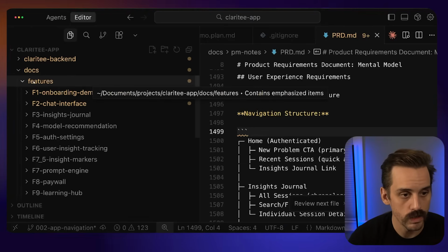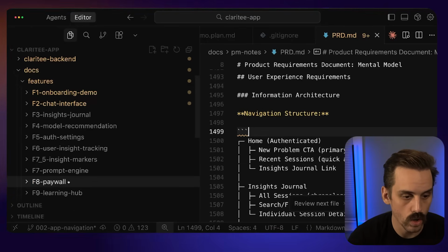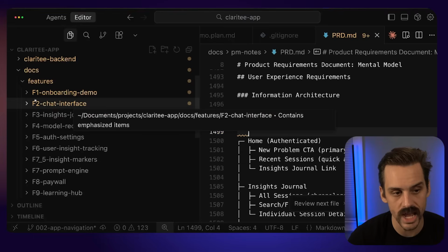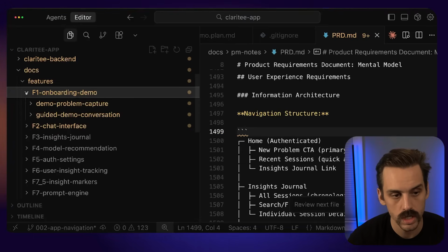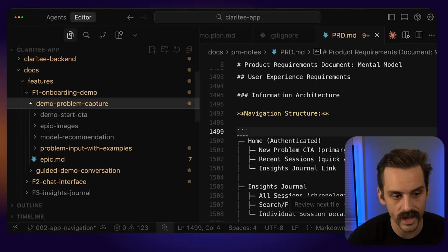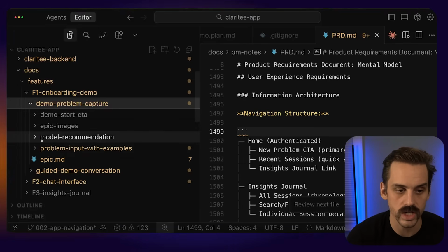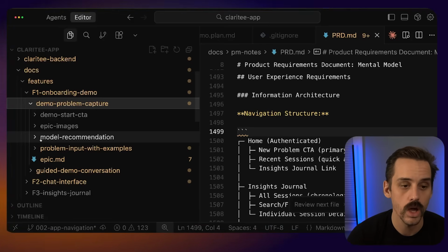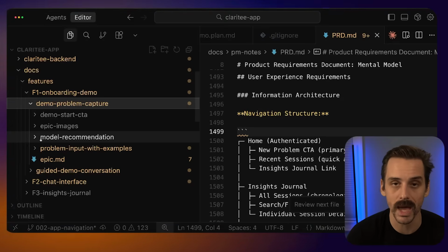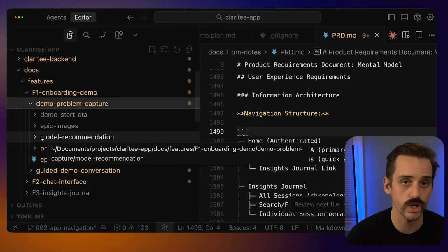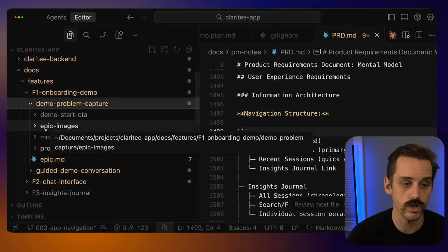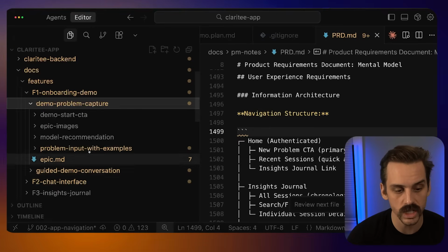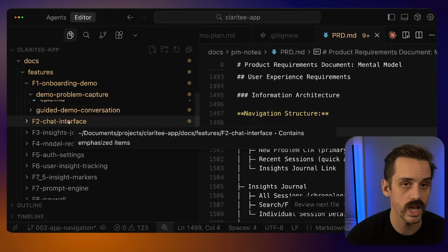So what I mean by that is before you start actually building out all of these different features that we got from those earlier steps, pop open each of these folders, look at each of the epics inside of it, look at all of the stories inside of that epic, and really ask yourself if that thing actually needs to be there in the MVP, or if it can be pushed into the backlog. And if the answer is that it's a nice to have, it's not a critical path, then just do that and save yourself the headaches of moving slowly through each of these features as you're building things.